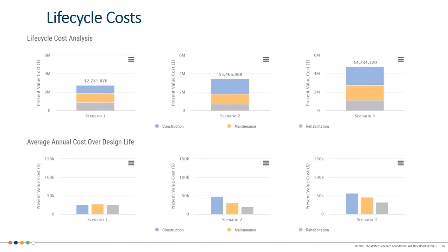So again, this comes back to the budgeting. How do you think about budgeting long-term when we know that these are maybe 30-year projects and you might be funding them and financing them in certain ways, where if you take the life cycle cost approach, you make the decisions a little bit differently? Yes, the $2 million infiltration trenches may be cheaper, but over the long run, and you want to start to think about those co-benefits, the $4 million budgeted and financed in a certain way might be the selection that you want to make.